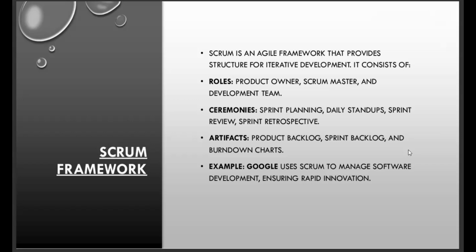The team members are also able to do a review at the end of the sprint to check if what they worked on during the sprint is in line. And then they have what we call a retrospective meeting, where they look back on what they had done, what they didn't do well, and how they could improve upon what they had done in the last sprint in an attempt to become even better as they move into the subsequent sprint.